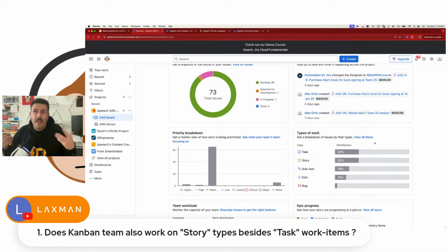But now you're going to be able to communicate with your leadership and set expectations of, look, our teams are spending X amount of time just doing research. And here's the data. Here's all of the work items that we did for the last month. And look, 75% are spikes, 10% are stories, 20% are tasks, right? You can now start doing that kind of narrative by breaking them up into types. So I'm a huge fan of having more issue types rather than fewer, just because we can add context to the narrative.